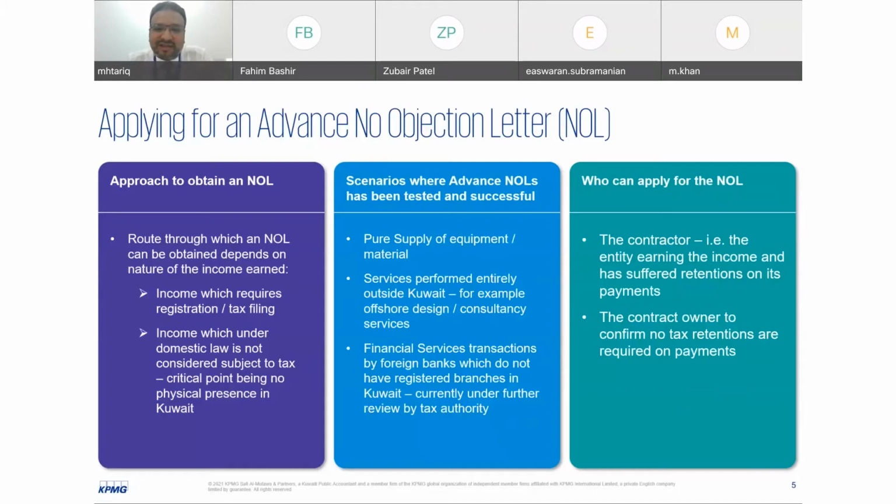Second part, I think, Fahim, this is very important: who can apply for the NOL? Most of the time companies are asking whose obligation this is. Frankly, it's the obligation and responsibility of contractors. It's not the obligation of the contract owner. Their obligation is to retain 5% in the law, and contractors, service providers, and suppliers are required to clear all their tax obligations in Kuwait and obtain a tax clearance certificate for the release of tax retention.